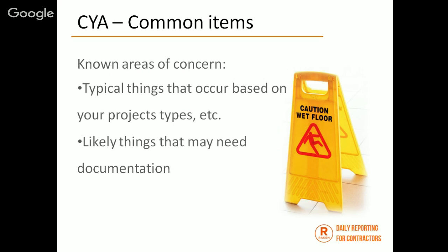Now, we can't cover everything. Again, we're not going to have the exact pictures of where the accident occurred maybe, but if you have a habit of your daily reports coming in every day with notes from your superintendents and foremen that this stuff was checked at the end of the day and the beginning of the day, and you did proper layouts and it was painted and all that stuff, and you have pictures and checklists, it's a lot better in the defense department when you're in those situations. These are the common things. So if you do certain things where these risks and hazards exist, you want to make sure you're reporting that you're doing the right things.